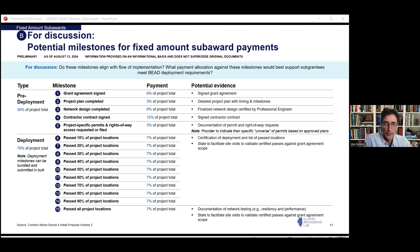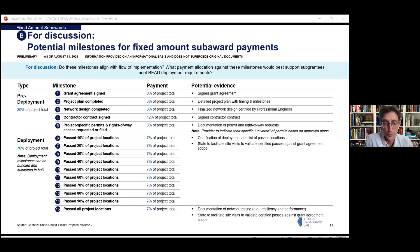Then you go to the second broad phase: deployment. This is pretty straightforward — breaking up the project into each decile of locations passed. Each of those milestones, you tell the state you have reached that milestone, provide some certification, and that unlocks the next tranche of funding. This should look relatively familiar. This is implementation detail as the state finalizes this, and the final versions will be made available to applicants. This is a pretty fundamental aspect of how the state of Illinois intends to take advantage of the flexibility provided for the BEAD program and implement it in Illinois to streamline things for both the state and providers.